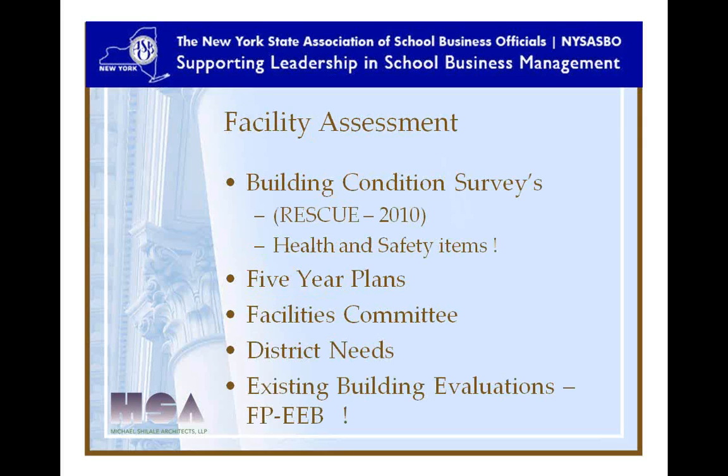Your facilities assessments, as I said, are made up initially of your building condition surveys, your RESCUE surveys. Last one was in 2010. You have to be careful there because anything that's a health or safety item in those BCS surveys and its life expectancy is under 5 years has to not only have a budget attached to it, but if you're doing any work in a particular building that has one of those health safety items that has a life expectancy of under 5 years, you will have to include that in the capital project for that building.